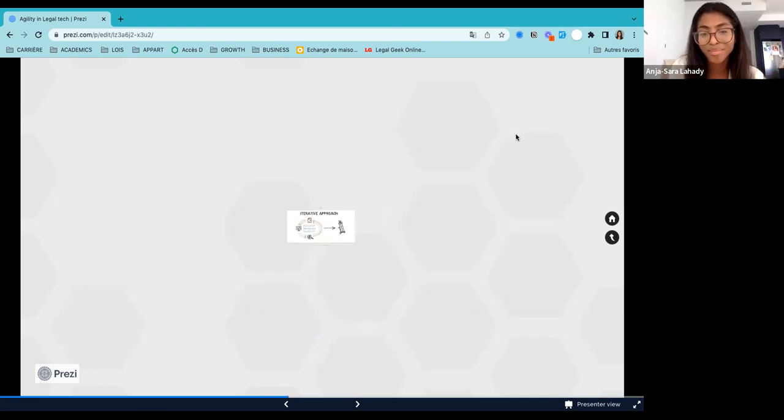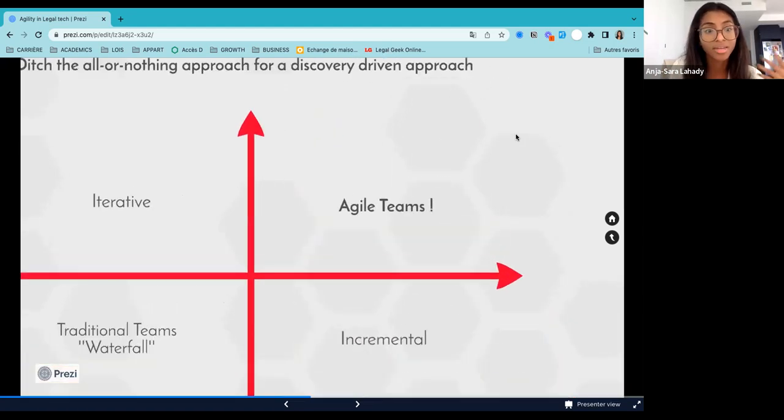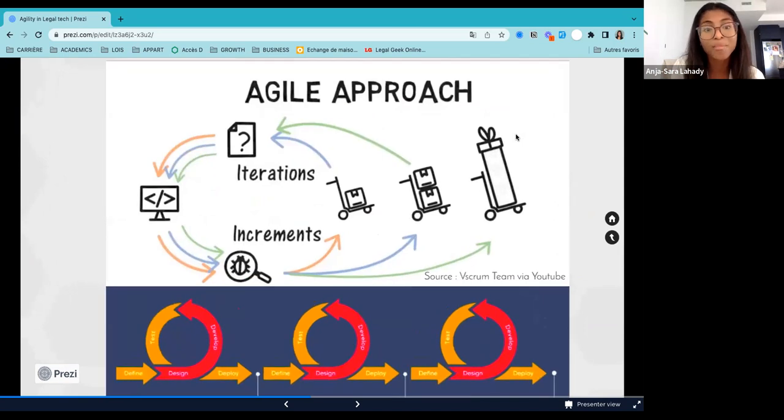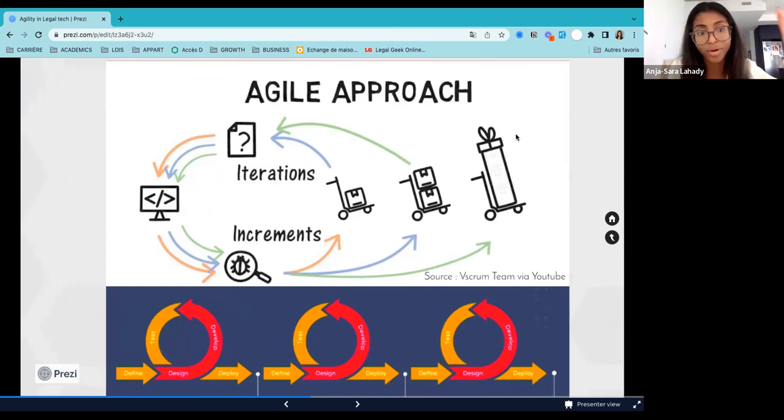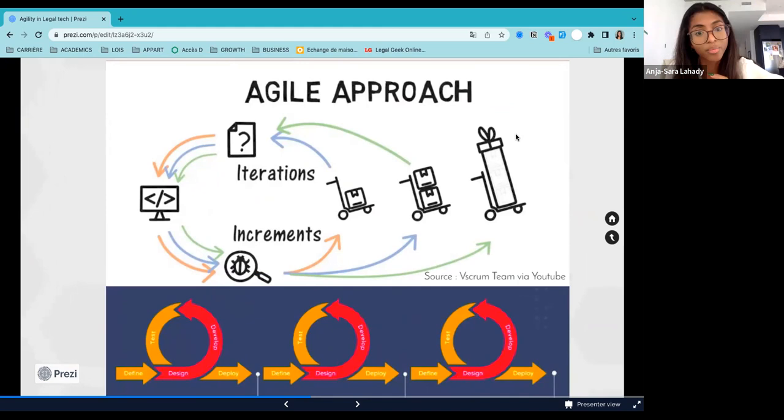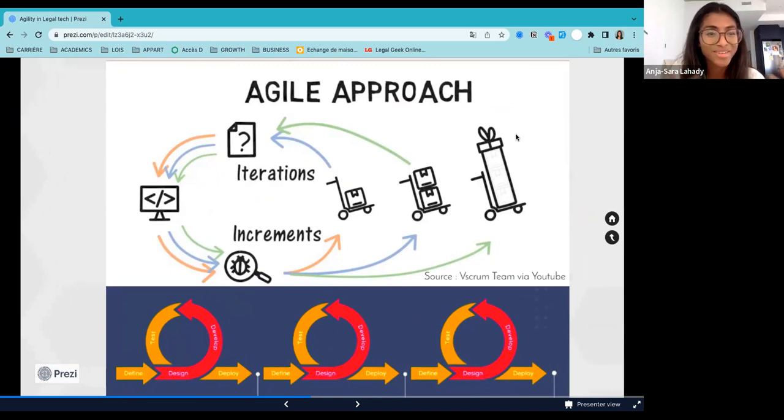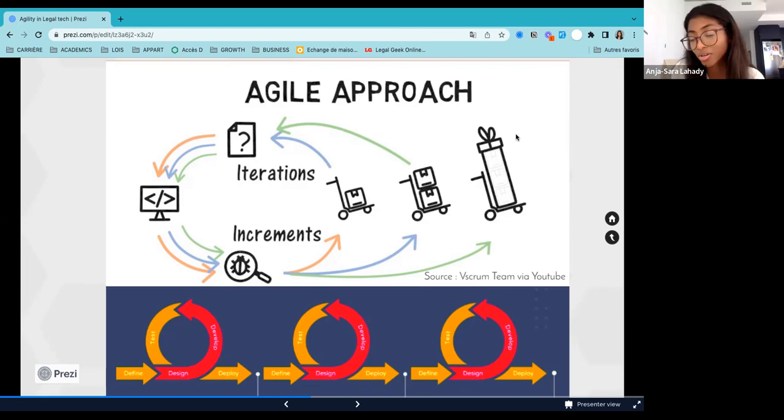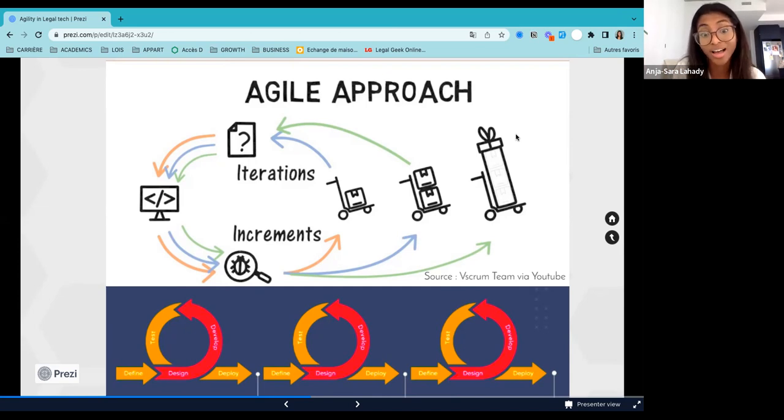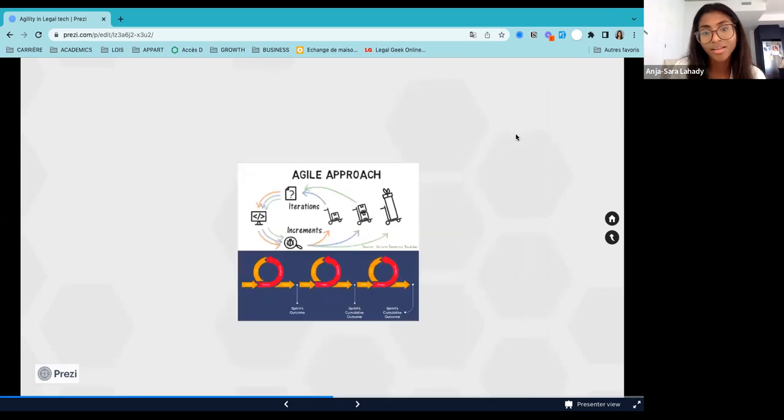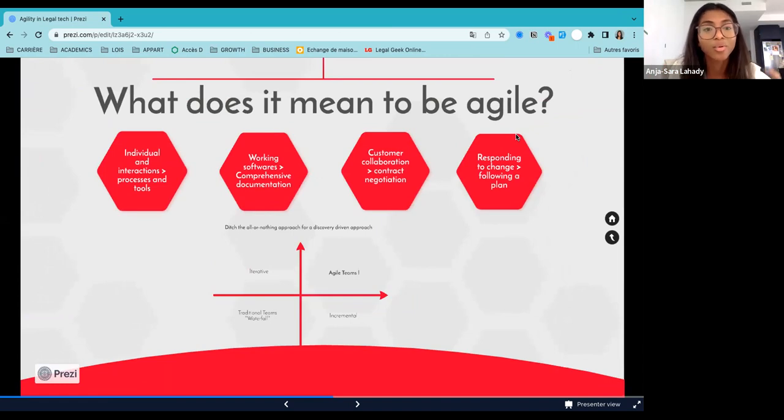Being agile is a mix of both of them. So we want to make the incremental and iterative to have a stage delivery, but to also have iterations. So you would deliver increments of that portal with some features, but you also use the feedback and data that you collect from the customers to iterate and refine it as you go. And then you would deliver another increment based on those iterations. And that would be the never ending loop or the never ending stage of being agile. So that would be the way you would deliver that final portal to your internal clients, to your lawyers and paralegals, and that would be a way to make sure that the final product, the final delivery actually fits what the customer needs, because you had so much increments and iterations along the way.